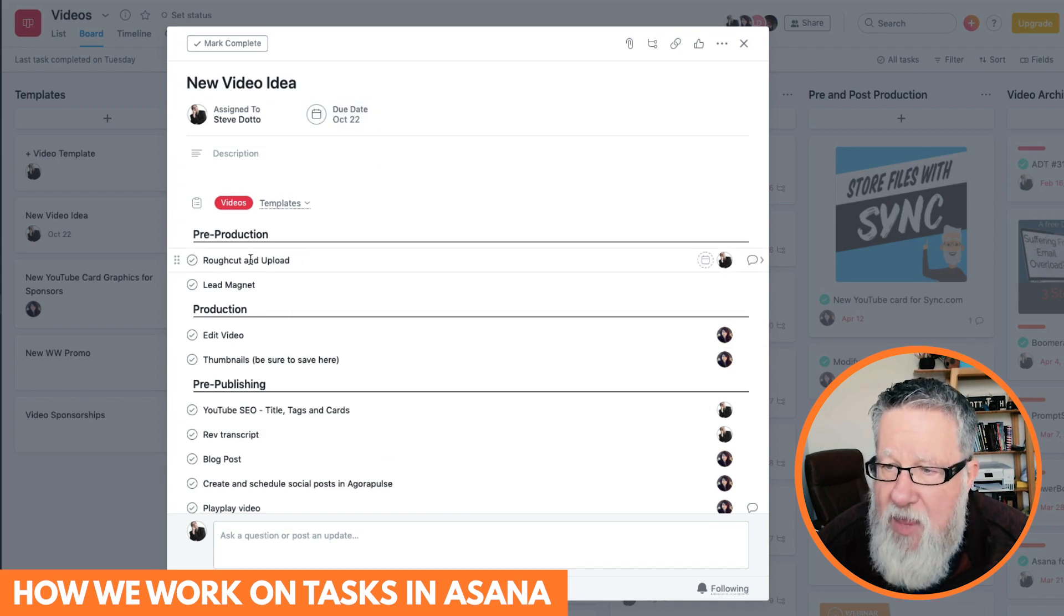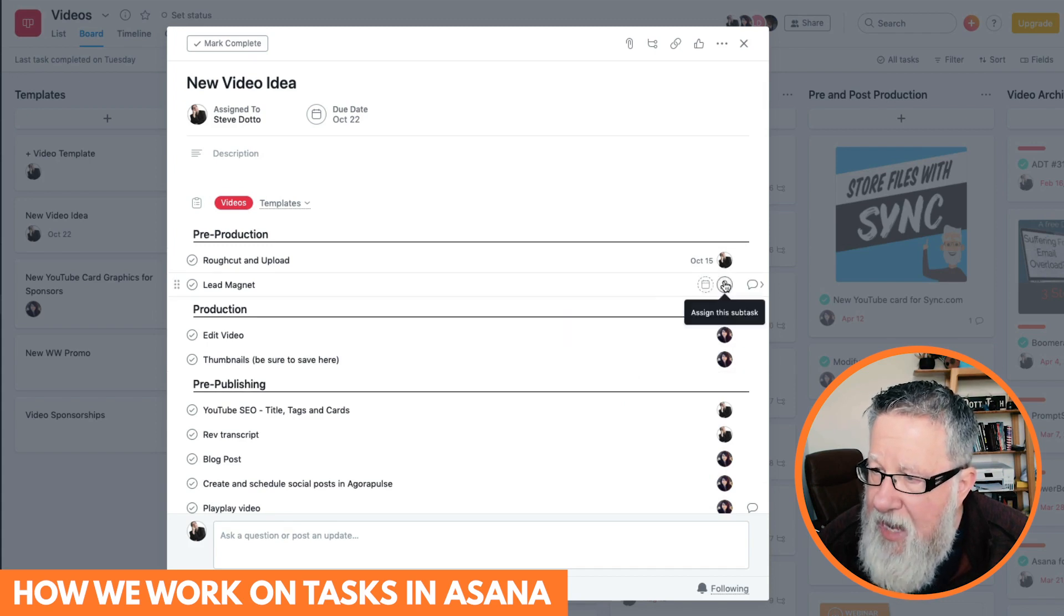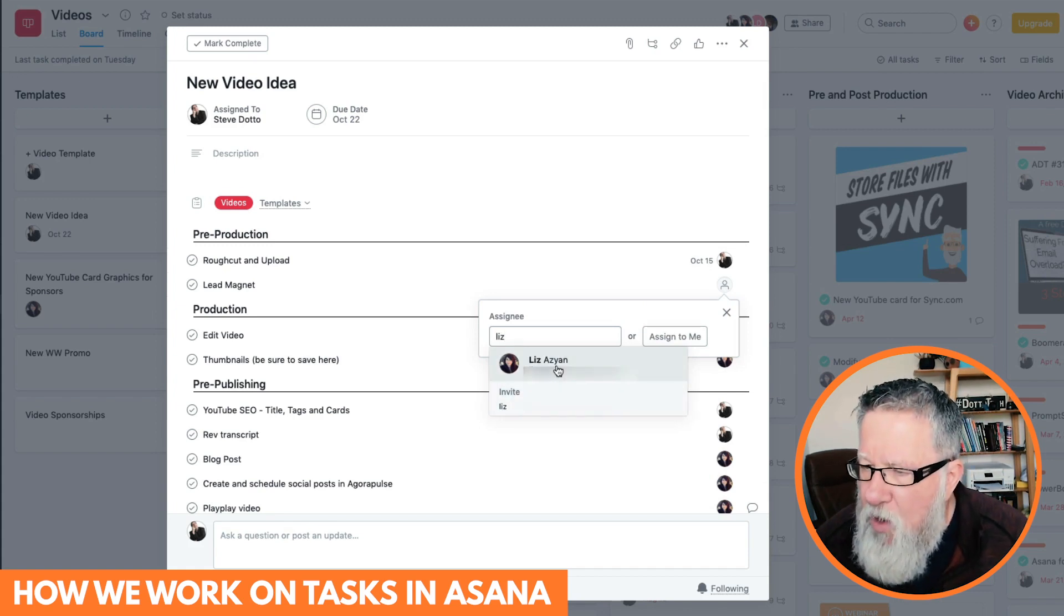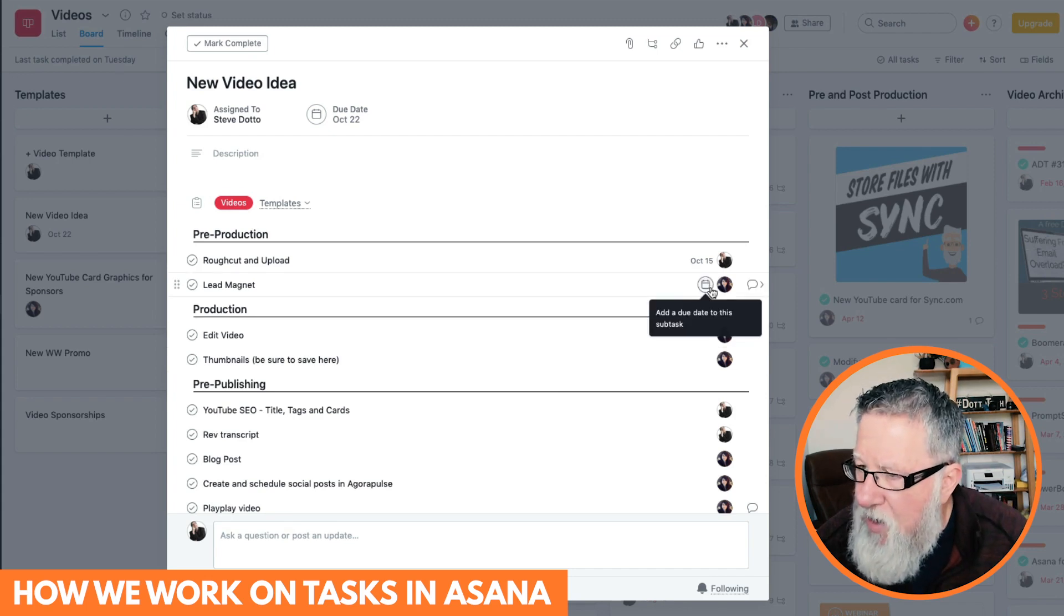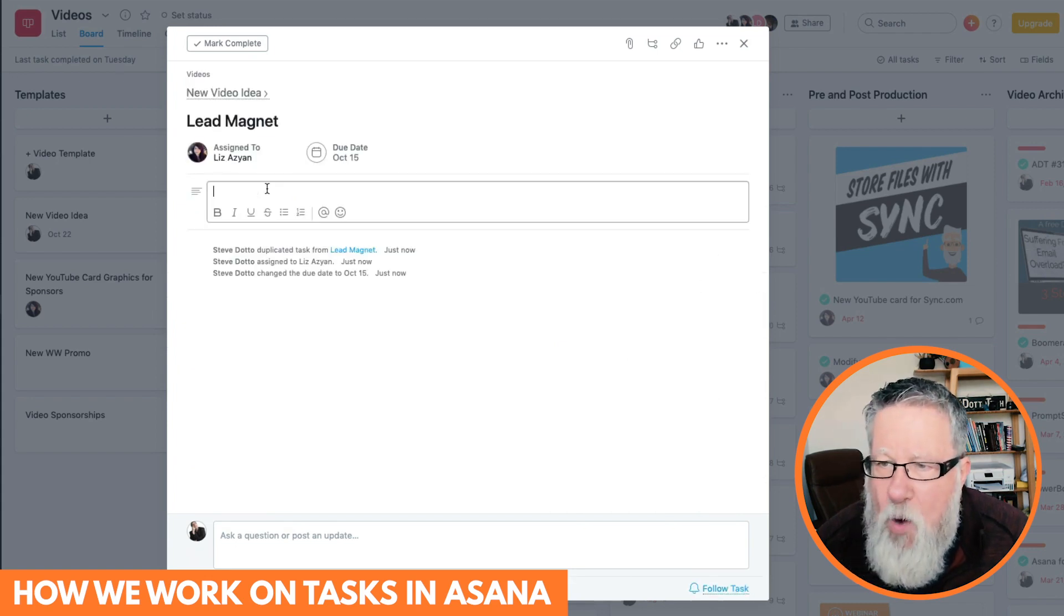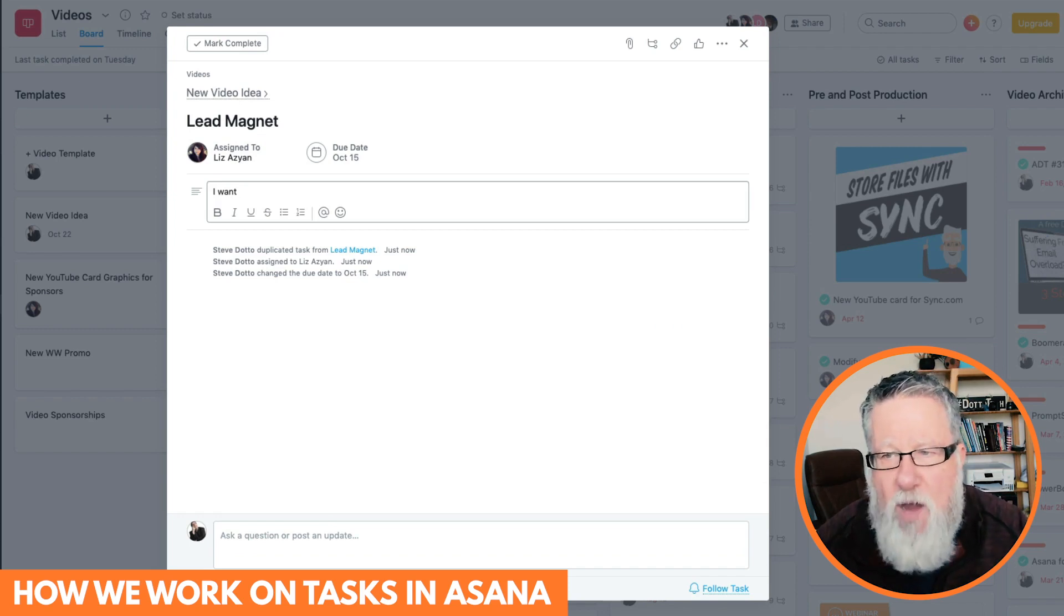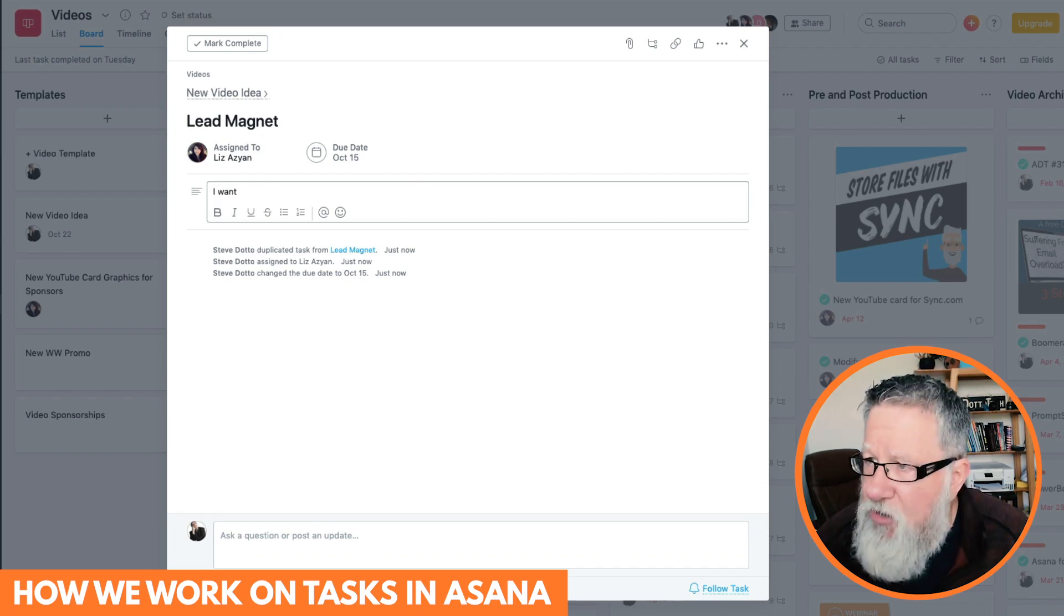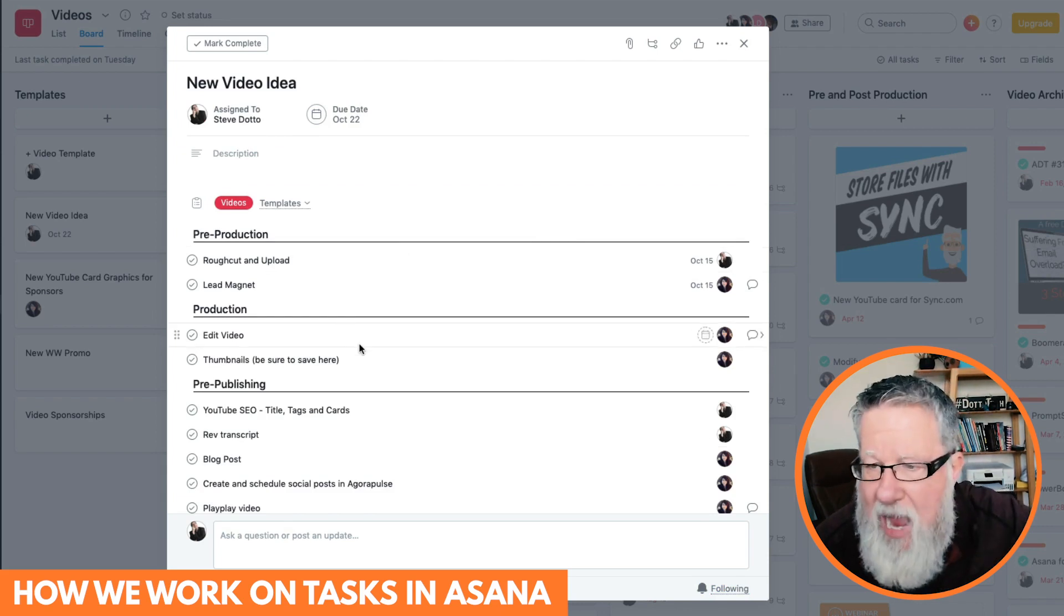And then I'll go in, I'll say, okay, this is the date that my rough cut of the video is due, and I want Liz to create a lead magnet for this one, which would be like something that we are going to offer in the video to create people to register, say, for our newsletter. And so we can create that part of the task. And then I can go in here, and I can go into the description and say, I want X, Y, Z for a lead magnet, and start the conversation happening. And then Liz, as I mentioned earlier, can respond in here to any communication that we have, based on this subtask of the overall task. And I go through and I assign dates and responsibilities for the rest of the pieces.